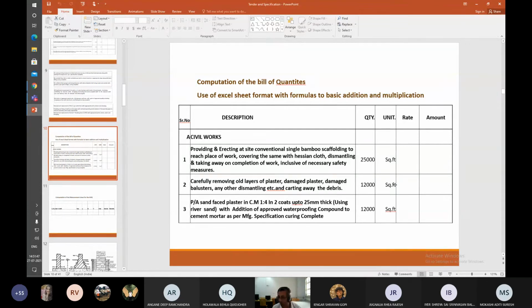As far as you know, what you are expecting, nothing is an issue. If you are expecting labor and you want to pay per labor, then you write 100 man hours. That means there may be 30 men working for 3 days, or there may be 100 men working for 1 day, or there may be 20 men working for 5 days. It all depends, and it comes down to your understanding whether that is right or wrong.